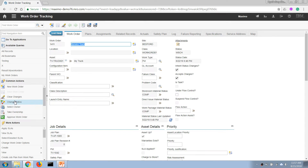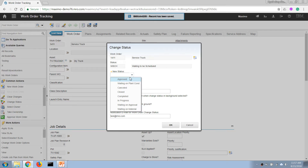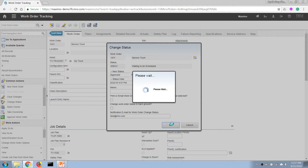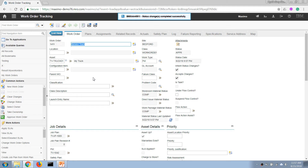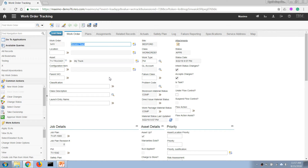After making changes, we can update the status of the work order to 'Scheduled' or 'Approved'. During implementation, we typically set up a workflow so the work order goes through the appropriate people and teams for planning and approval. If a safety procedure is involved, we would also need to acquire a permit to work or authority to work. In this case, I'll go ahead and change the status to 'Approved'.